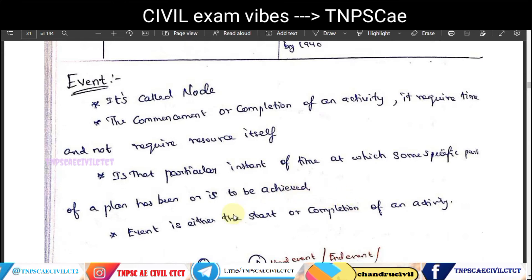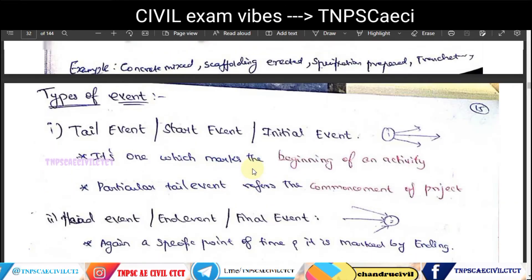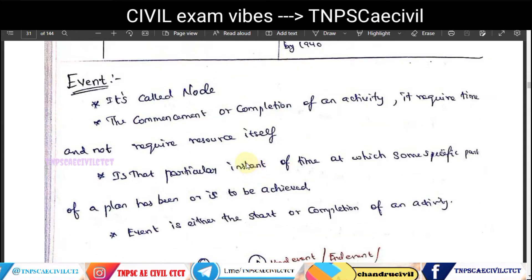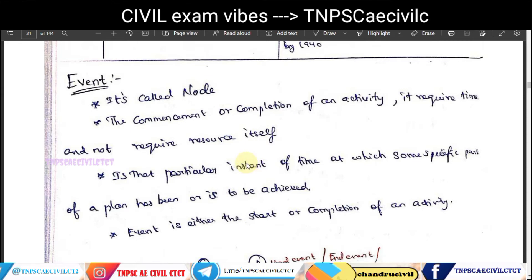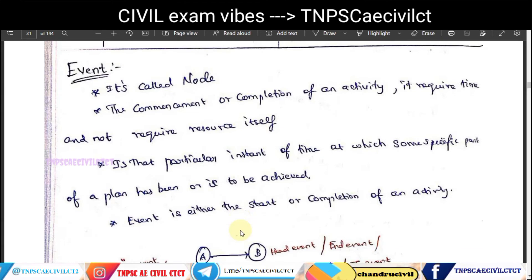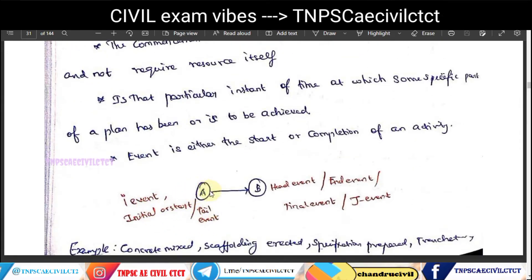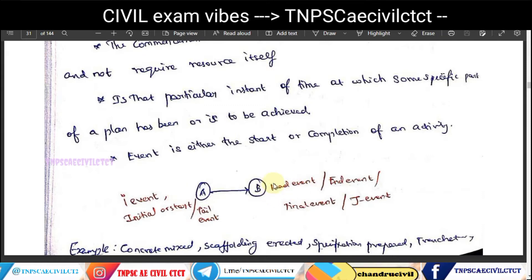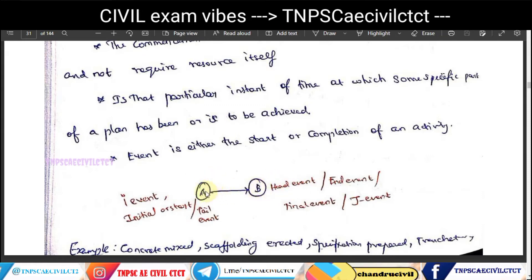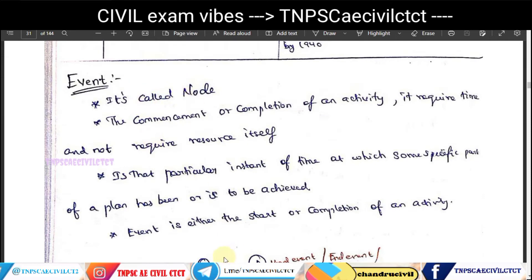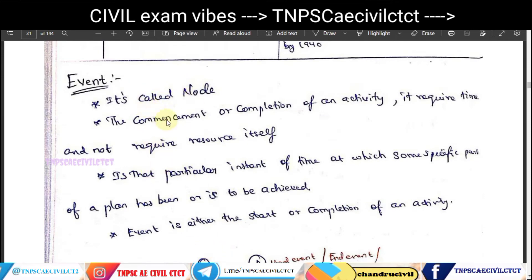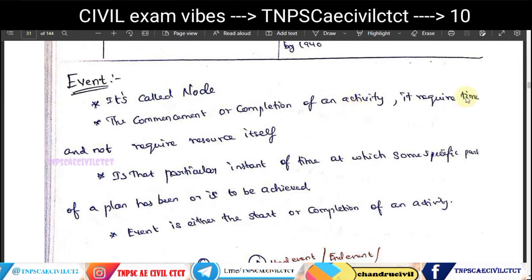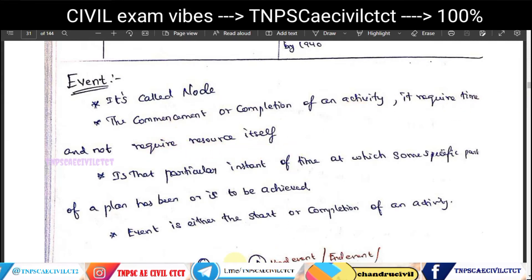Next, we discuss types of events. An event is a point in time and is part of an activity. It is called a node. The completion of one activity marks the start time of the next. An activity requires both time and resources, whereas an event requires time but not resources.